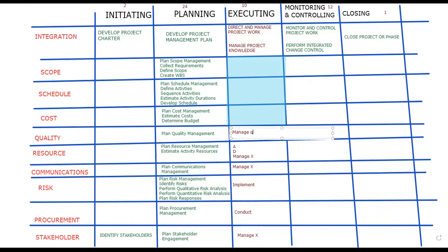And this is where you're carrying out your quality audits. A quality audit is carried out before the deliverable is created. So it means you're actually checking the process. You're not checking the product. You're checking the process to see how well we are carrying out the work based on the quality standards we're meant to be adhering to.